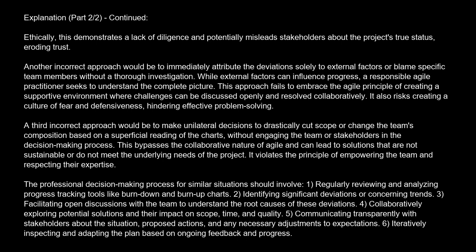The professional decision-making process for similar situations should involve: 1. Regularly reviewing and analyzing progress tracking tools like burn-down and burn-up charts. 2. Identifying significant deviations or concerning trends. 3. Facilitating open discussions with the team to understand the root causes of these deviations. 4. Collaboratively exploring potential solutions and their impact on scope, time, and quality. 5. Communicating transparently with stakeholders about the situation, proposed actions, and any necessary adjustments to expectations. 6. Iteratively inspecting and adapting the plan based on ongoing feedback and progress.